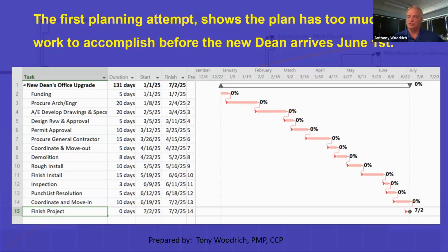The waterfall approach to critical path method scheduling has no fast-tracked activities. What's fast-tracked? That's overlapping tasks that can be worked on concurrently. This waterfall method works, but it's not optimizing the schedule for shortened finish date.